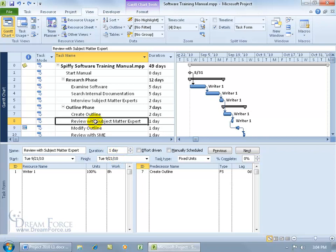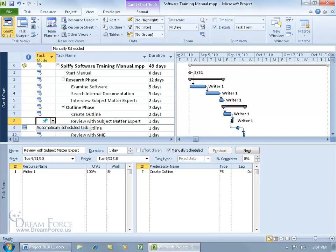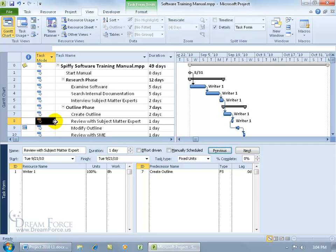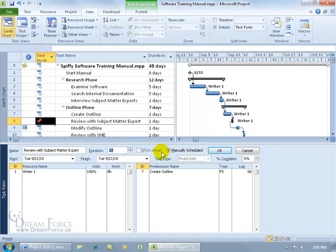Let me convert this from auto scheduled to manually scheduled — either by changing it in the Gantt chart where you can see the push pin, which reflects the change in the task form below, or by unchecking it there and clicking OK, which updates it in the Gantt chart and the task mode column. So just choose which way works best for you. When I come down and change the duration to two days and click OK, the work updates: 100% means 8 hours per day, so 8 times 2 days equals a total of 16 hours of work.